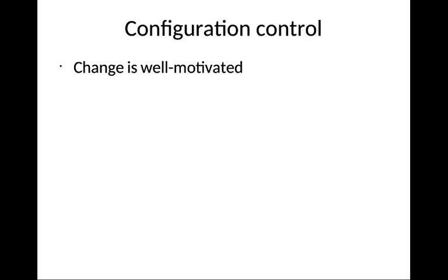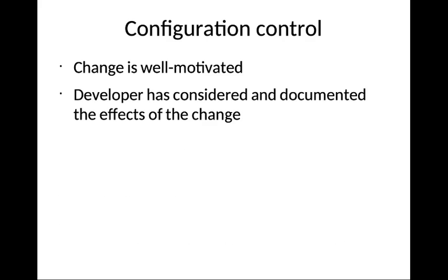The CCB has to review the changes that have been made. The CCB may be the project manager or a set of developers. They will check all these things. First they will see whether the change is well motivated. Then the CCB will check whether the developer has considered and documented the effects of the change.